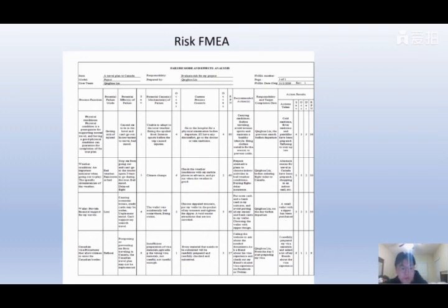The second one, bad weather, rainstorm or hail. The probability of a weather disaster is very large and unavoidable, which makes me unable to go out and stay indoors. Weather disasters happen frequently, so the severity here is 5, the occurrence is 6, and the detection is 2. The RPN is 16 here, and the action I think is that both Montreal and Toronto have big shopping centers, which allows me to choose an indoor shopping center when the weather is bad.